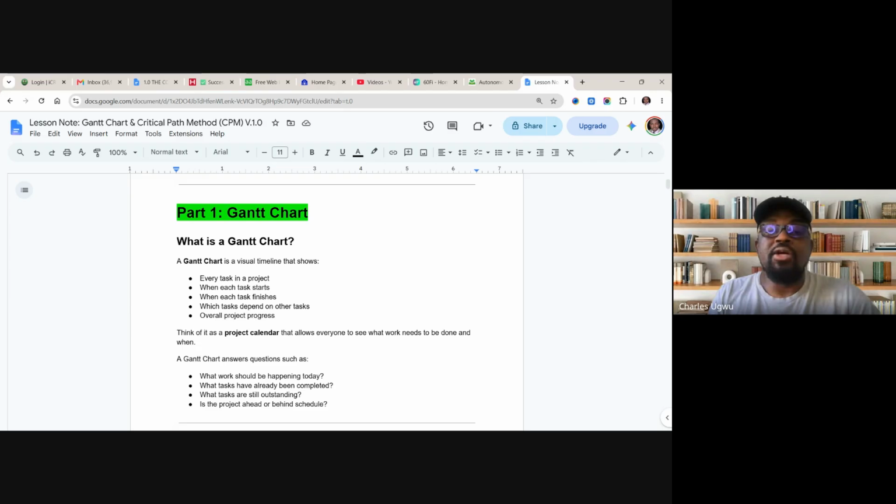But in a situation where there are areas called slack, and we didn't capture slack in our first project in the Gantt charts, the one we use in project. We didn't capture any slack. But in a situation where there is slack, we can afford to delay some activities within the slack, and it's still not going to affect the way we are managing the project.